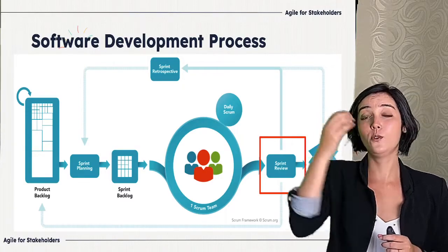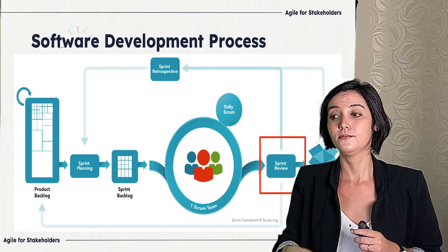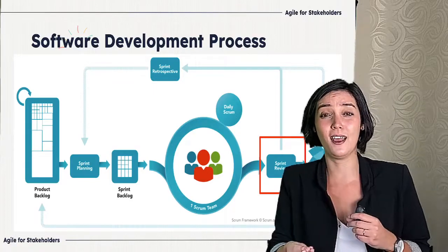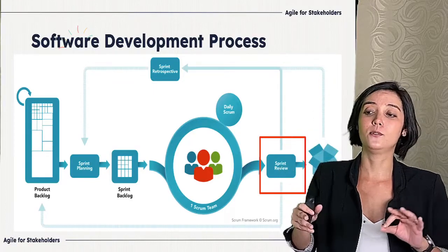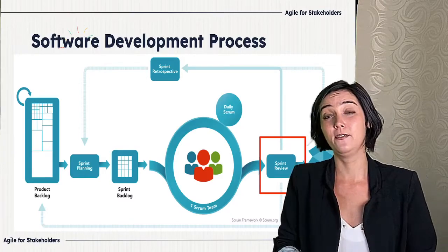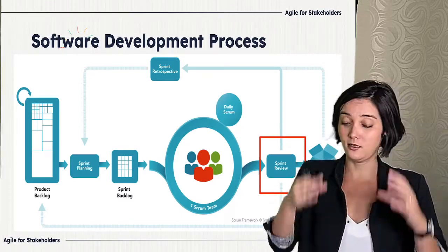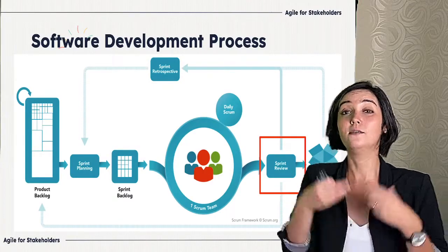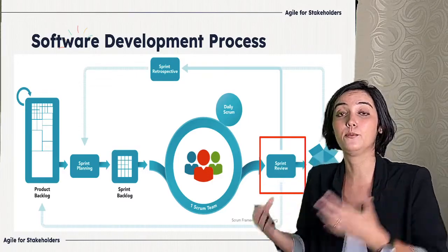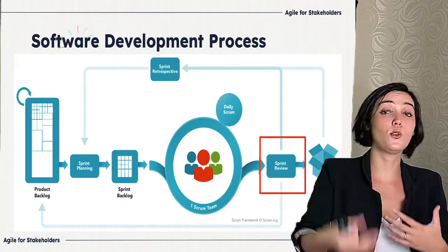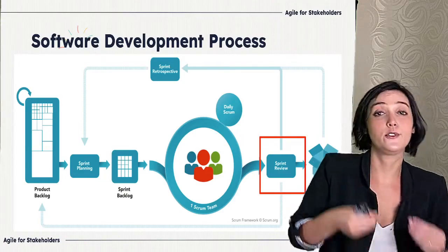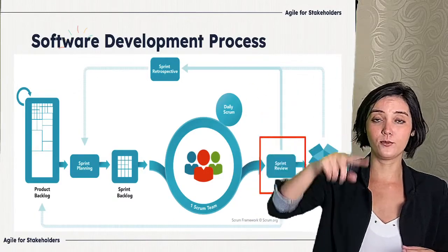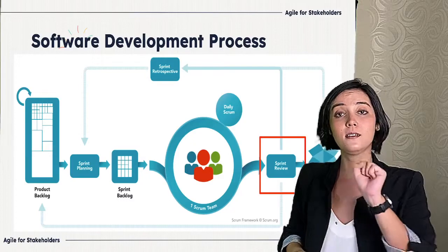So in the sprint review, we present the increment. The Agile team, the Scrum team can demonstrate what they have done. And we have the retrospective. The retrospective is when the Scrum team sits together, sees what they have done, and what they should have done better. Like what we can improve in our team, in our daily, in processes, and everything to be better, to be more agile. Okay, and after 2 weeks, everything restarts again. So this is Scrum.